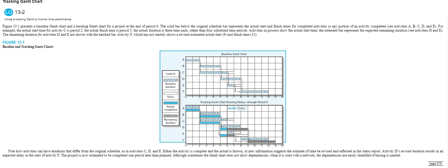At the end of the schedule development process, you will create something known as a baseline. There's a baseline schedule, baseline scope, and a baseline budget. The purpose of this is to announce to all stakeholders, including the sponsor and the client, that this is what is being agreed on going forward. And if any changes are requested, they must be formally requested through a formal change request and reviewed by the Change Control Board. But the baseline is the line in the sand against which the project team executes.